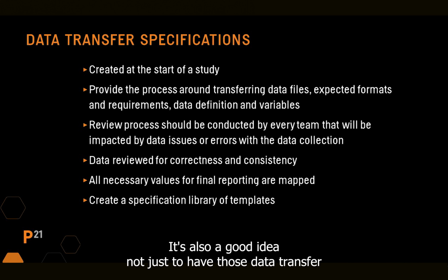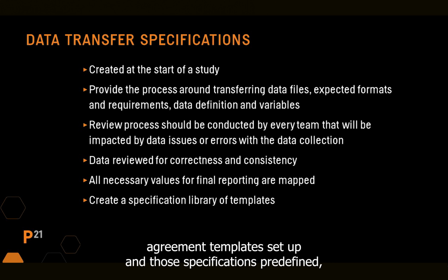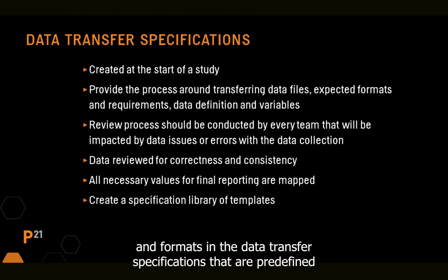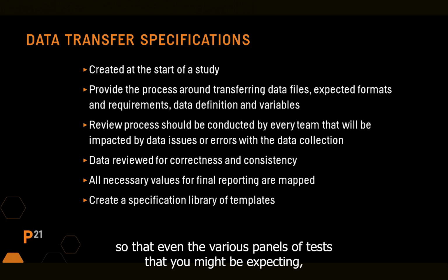It's also a good idea not just to have those data transfer agreement templates set up and those specifications predefined, but to have some kind of library of each of these structures and formats in the data transfer specifications, predefined so that you know even the various panels of tests that you might be expecting.